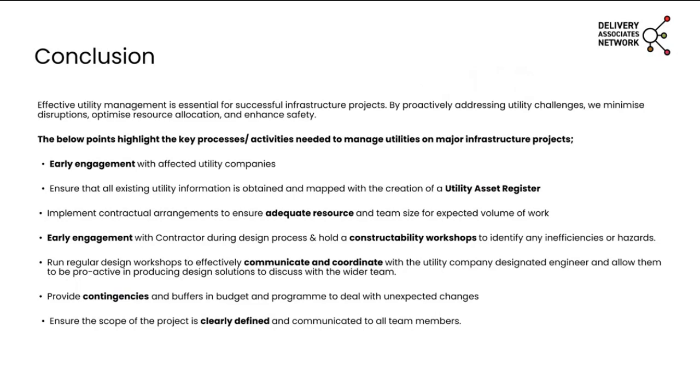Early engagement with a contractor, as I mentioned, to understand some of the constructability issues. A contractor with experience of this sort of thing will be able to identify any hazards, any risks. Getting them involved early on allows those risks to be mitigated and appropriate measures put in place, something that's very, very important. Design workshops, as I've spoken about,